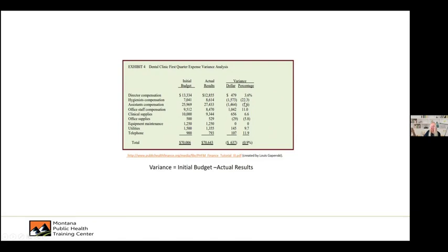So we can quickly look down here to see what's the deal. Anything that is in parentheses is how they've shown the negative here, right, which we saw here. But look at that. That's the percentage of what was budgeted, right? Not the percentage of the overall budget, but the percentage of what was budgeted here. We look quickly and we can see, oh my goodness, it's this hygienist compensation that's really throwing us off. Now, there are a couple other areas where we've spent more, and the assistant's compensation being up 5.6 percentage points, I should say, is a big deal, but more so is this next one, right?